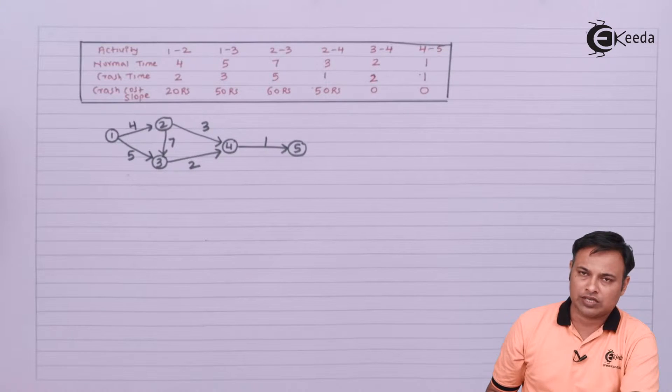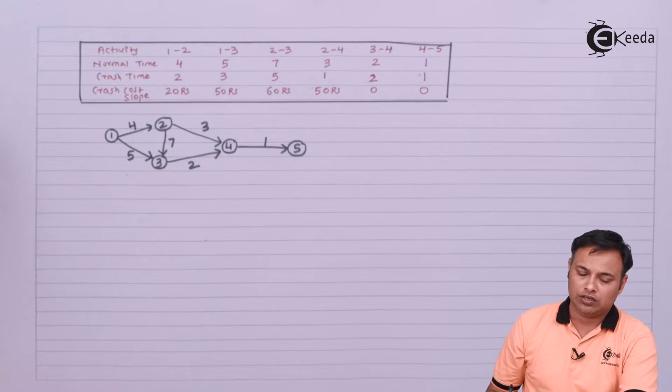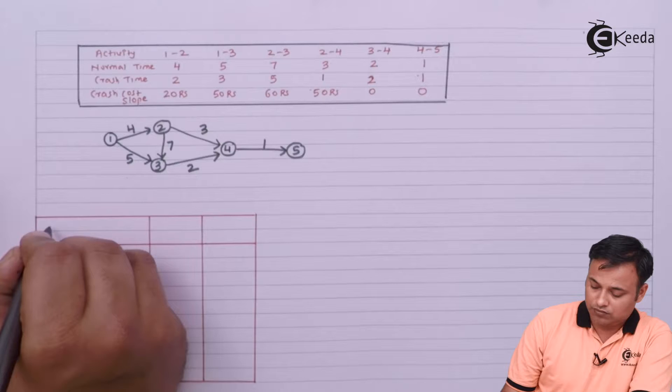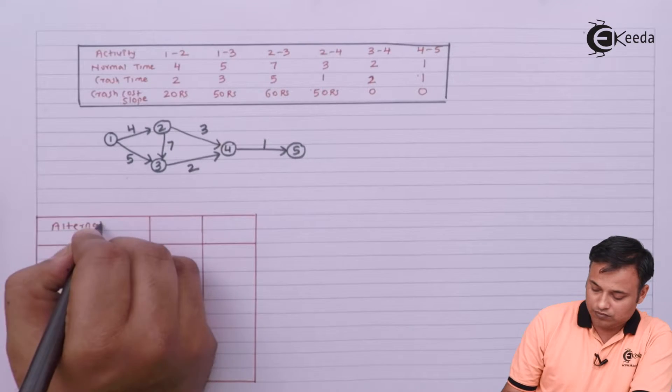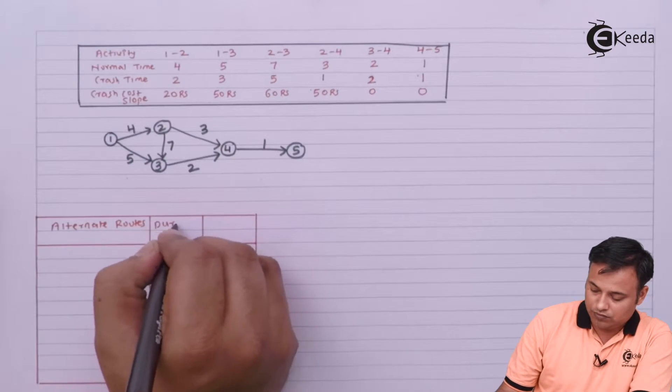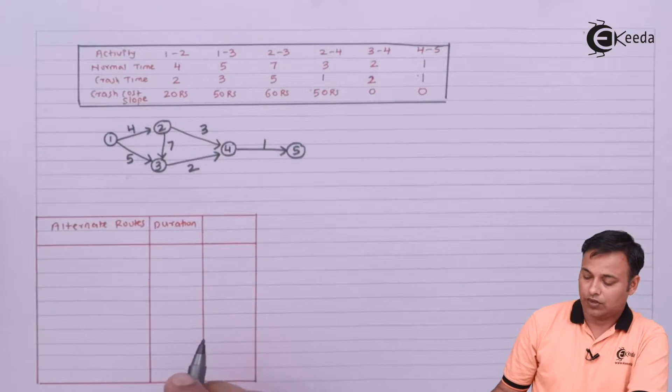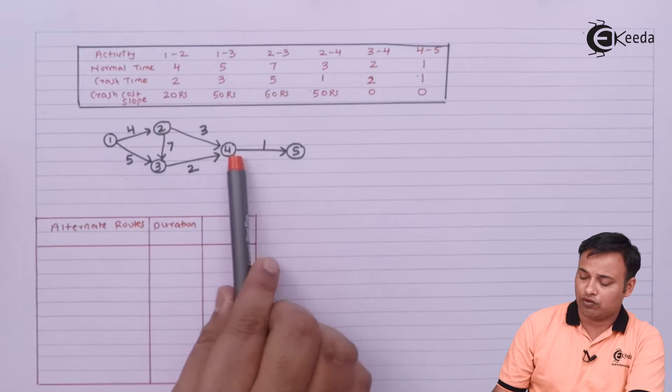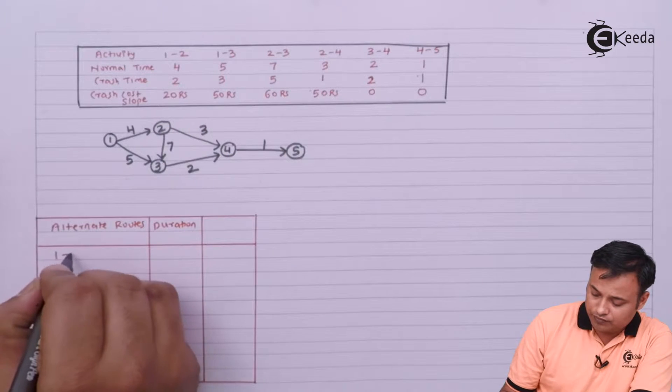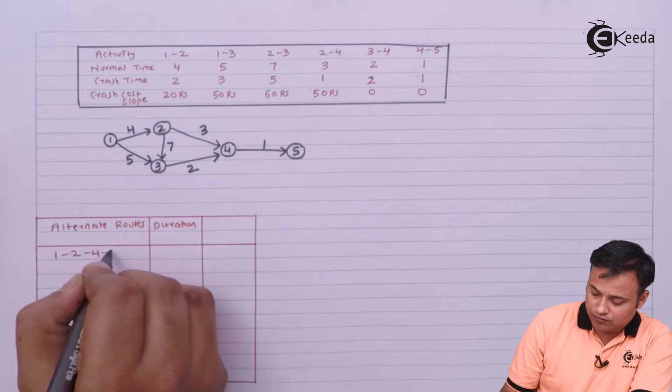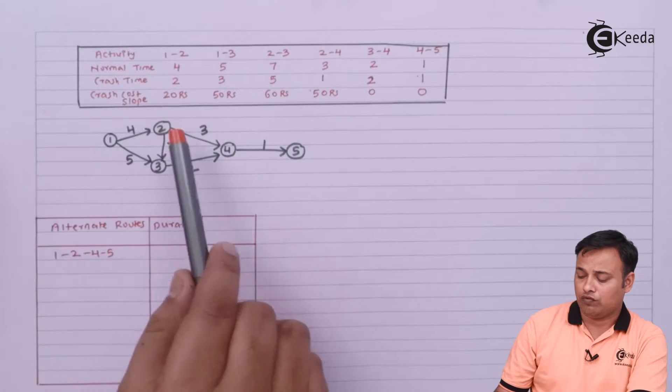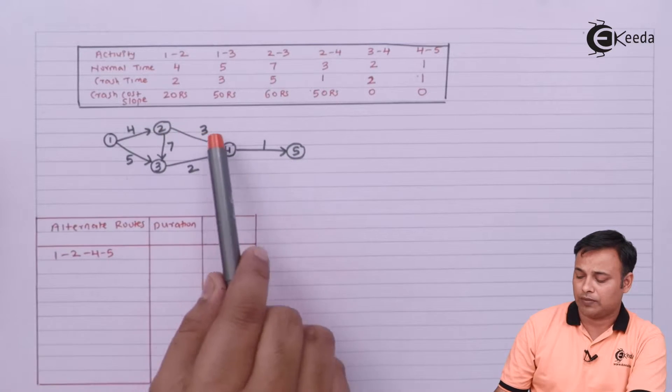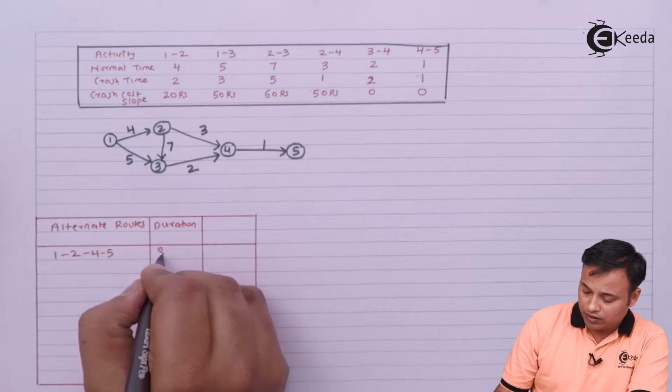Now what are the alternate routes available and how I can work out the crashing, let's see. Let's find the alternate routes. My first route will be 1-2-4-5, and 1-2-4-5 will be 4 plus 3 plus 1, which is 8.